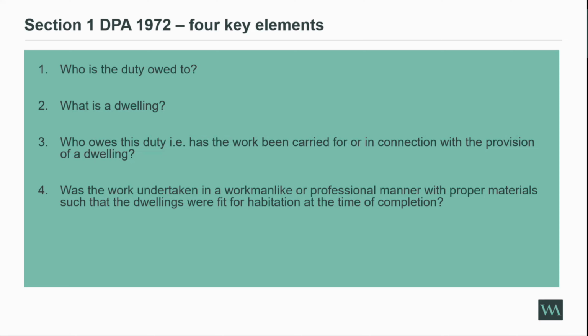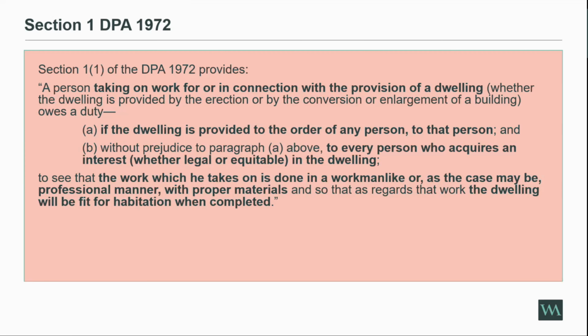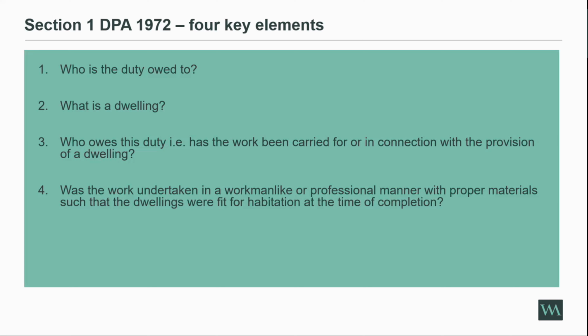Now, the first aspect, if I just pop back to this word, is your workmanlike or professional manner with proper materials. Usually, we can demonstrate this by considering whether the works complied with building regulations or any other standard in force at the time of construction. And that's an understood universal way of demonstrating this. And this is obviously where the experts come in.